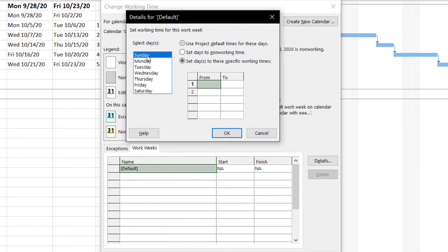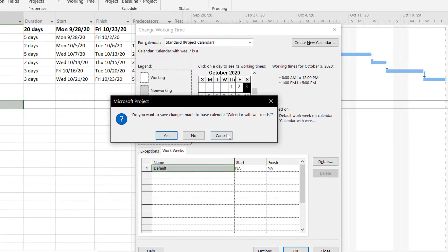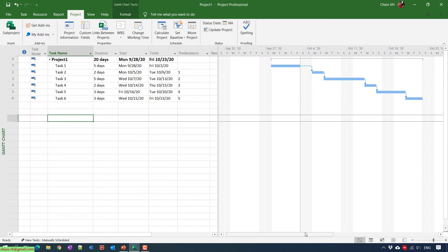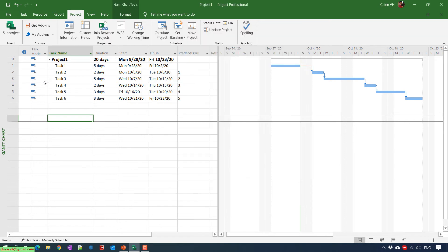Do the same thing with Sunday, then click OK. You can see the calendar is now named 'Calendar with Weekends'. When you look at Saturday and Sunday in the calendar, the background will be white, meaning these are working days. For comparison, in the standard calendar Saturday and Sunday appear in gray — indicating non-working time.